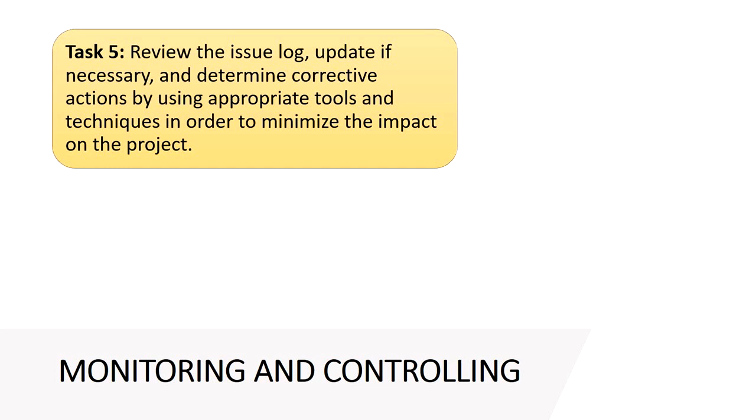So in the issue log, we have things like the issue type and who raised the issue, a description of the issue, and the different individuals or stakeholders engaged in the issue, as well as the status of issues. The project manager needs to ensure that these are investigated and resolved, as the PMI put this in the PMBOK Guide. And the issue log is created as an output of direct and manage project work in the 6th edition.